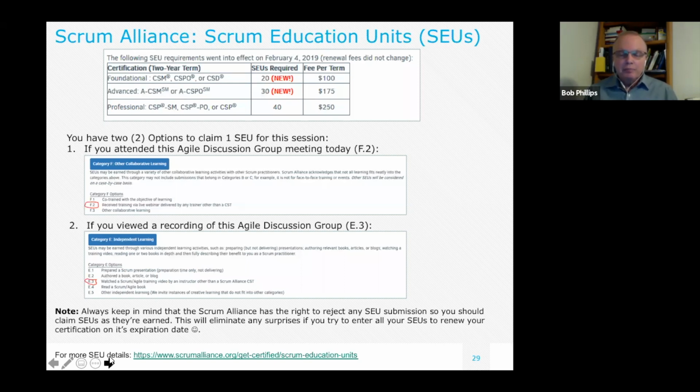It's really specific to the team as far as what they do, as far as how the estimates go. Each team will estimate differently. Now, when I had a Pune team and a New Jersey team, we estimated the same, because we're working on the same project and the same backlog. But if I have a team doing my project and then there's another Scrum team doing something totally different, the numbers could be totally different, and that's totally fine. You never compare story point estimates between teams.